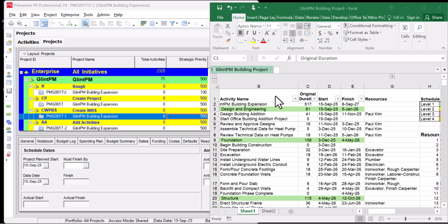But most of the time when you do it that quick, that fast, you don't get the best logic or the realistic one. So most times, after that first draft, you share with your team, they look at it. No, we want this activity to finish at this date. Or the sponsor will say, no, this is not realistic. This is not in line with our objective. So you have to revise, and that's why I did the second video where I showed you how you can achieve those dates by reviewing your schedule, by adjusting the logics, by removing and reassigning the relationship.